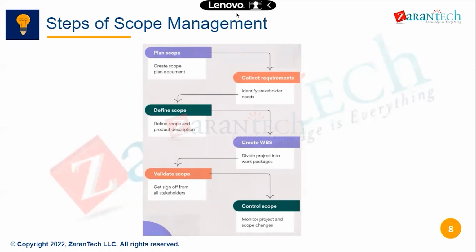Control scope is about any actual versus planned differences, whether in requirements, cost, or time. For example, you committed to 10 requirements, but in actual you gave only 8 to the end users. There is a variance. Why did such a variance come, are the requirements not proper, what is the root cause? You identify all that as part of control scope.